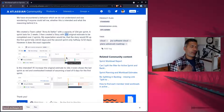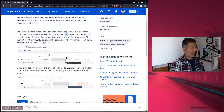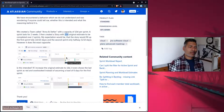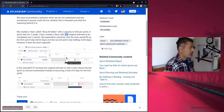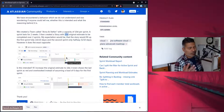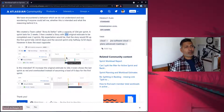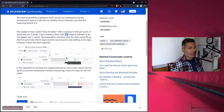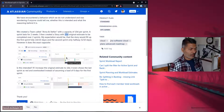If you're expecting your story to span across multiple sprints, that is fine — you can probably do some work in sprint one, and then when you complete your sprint, you will basically have to move your story to the next sprint, which is fine, it happens. But in your plan, you should intend to deliver the stories that you commit.